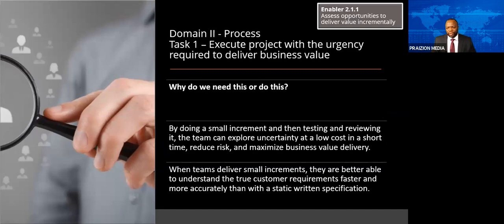By doing a small increment and then testing and reviewing it, the team can explore uncertainty at a low cost in a short time, reduce risk, and maximize business value delivery. When teams deliver small increments, they are better able to understand the true customer requirements faster and more accurately than with a static written specification.